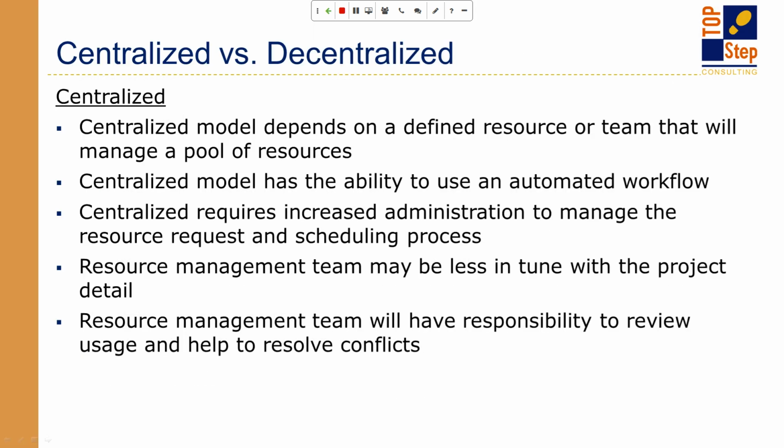Okay, first let's talk about centralized. What do we mean here? The centralized model relies on designated resource management personnel. These are the people who are responsible for managing your resource pool. Pretty specific. These resource managers will track resource availability, determine project resource needs, and proactively identify risks and needs for the resource pool, such as too much bench time, not enough qualified resources to meet future project requirements, conflicting project requirements, things along those lines.